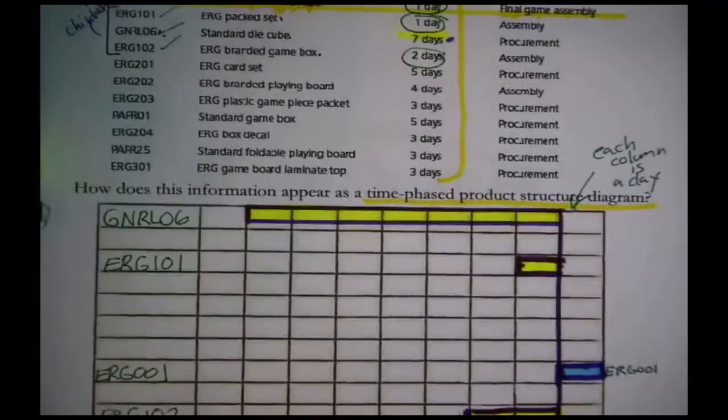Now, I have 4 out of the 11 items on the diagram. See the pattern? I just keep going by asking myself, of what I just drew now, which is 3 things, do they have any children? Because if they have children, it's time to add them to the diagram.